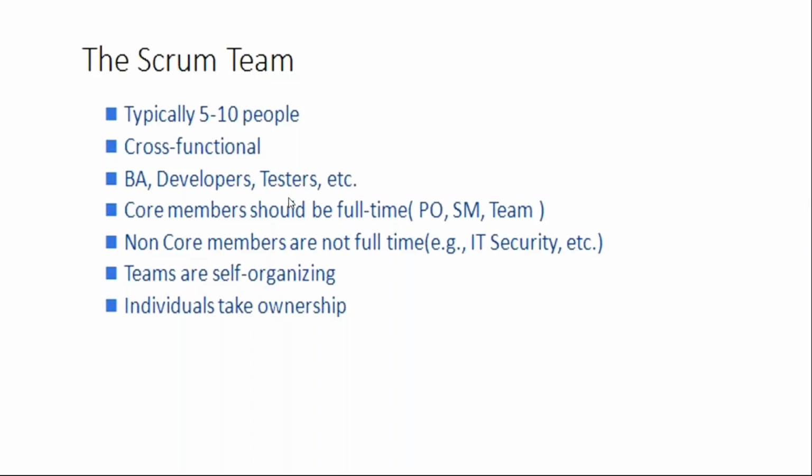And here again, I am emphasizing this word, teams are self-organizing, because they themselves will say, Kaushik, last time we worked on that, the requirements were not clear. So this time we have already gone through the user stories of the upcoming sprint, and these are my questions. As a Scrum Master, you should ensure they are doing it. And the Scrum Master and the product owner should always work on the current sprint plus two, so that you are refining the backlog in the long term also. If there is any scope change, you can address that.